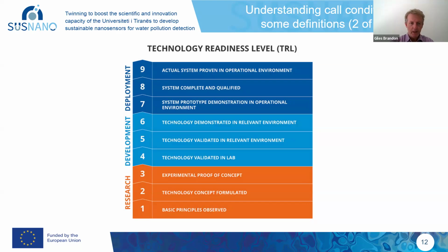So anyway, these TRL levels start at TRL 1. We're not going to read through all of them, but in essence, TRL levels 1 to 3 are really the research level, starting right with basic principles. When you get into TRL levels 4 to 6, it's no longer research per se, it's more development of a concept, validating the concept. And then technology readiness levels 7 to 9 are really about deployment, where you've done the research and the development. Now it's really about testing this technology, this system, in some sort of real-life, operational environment. Okay.